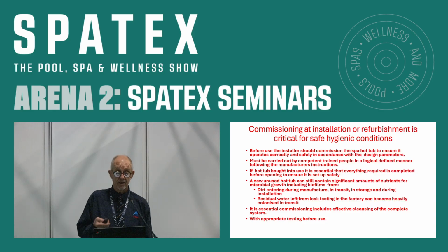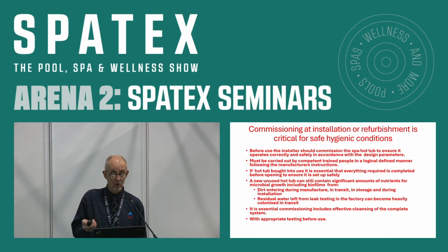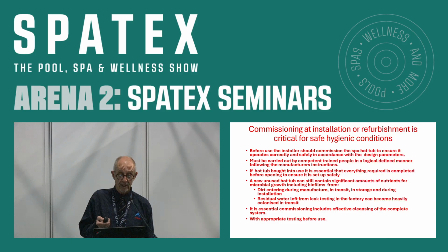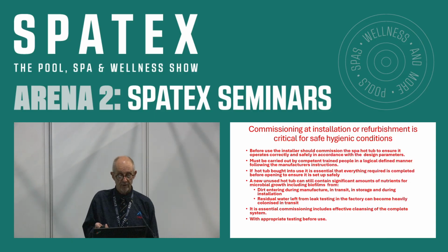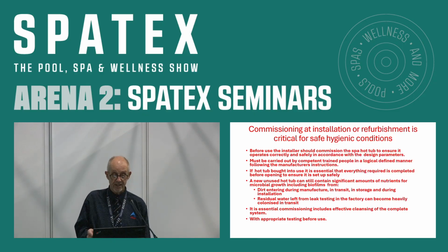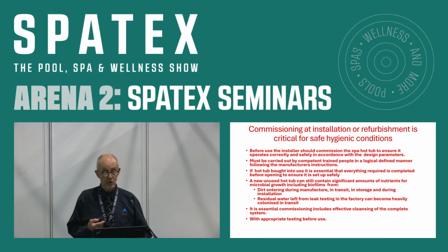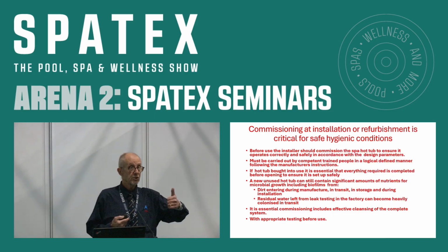Commissioning installing. If you have a new spa, before use, the installer should commission the spa hot tub to ensure it operates correctly and safely in accordance with design parameters. Must be carried out by competent trained people in a logical defined manner, following the manufacturer's instructions. If the hot tub is brought into use, it is essential that everything required is completed before reopening to ensure it is safe and set up safely. New spa, new hot tub, or one that's been drained down for works or whatever.